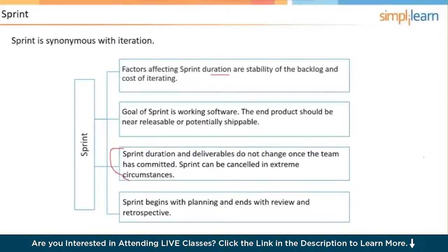So the agenda for the retrospective is what went well, what did not go well, what are we going to do different? And the mandatory participants for that meeting are the team, the Scrum team. Is the Scrum Master going to be there? Likely as a facilitator. Is the product owner going to be there? Maybe, maybe not. If the product owner is there, the product owner could maybe answer questions and help clarify.